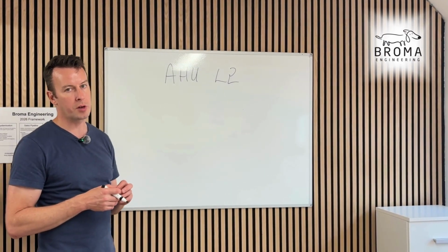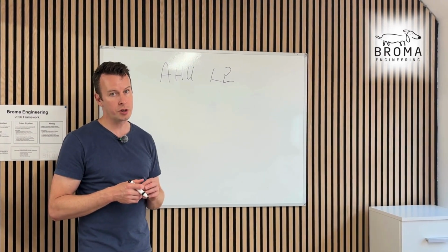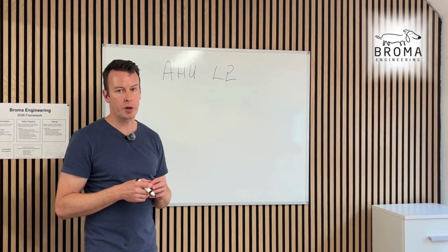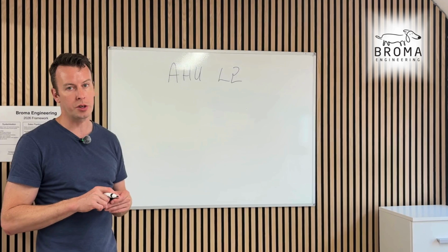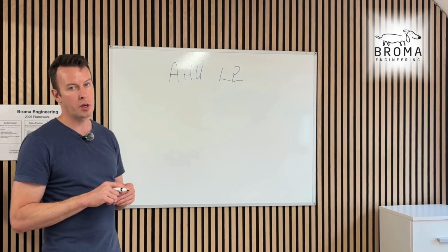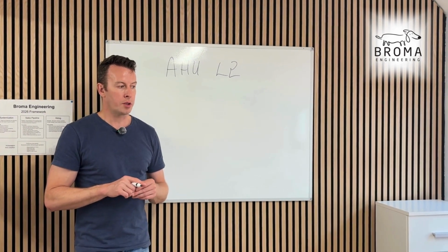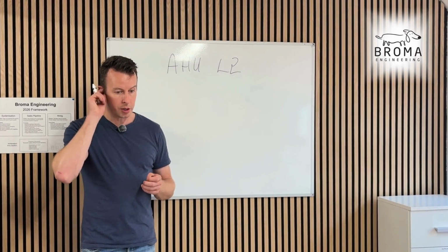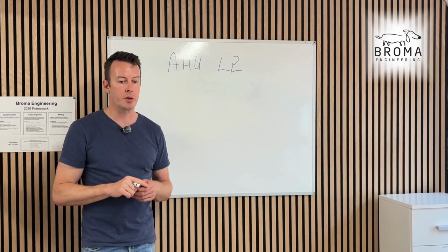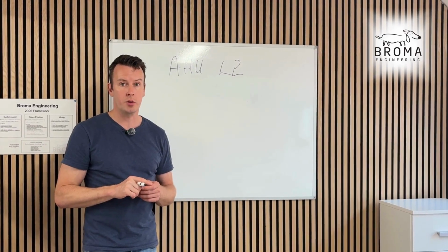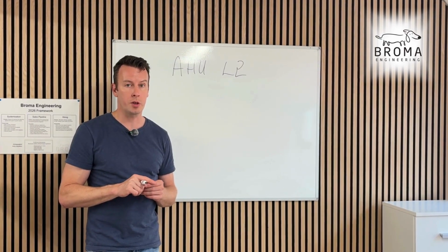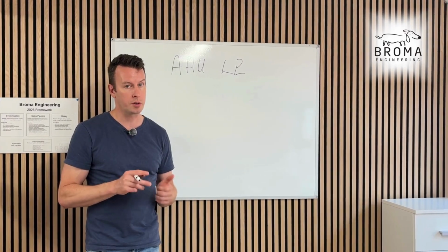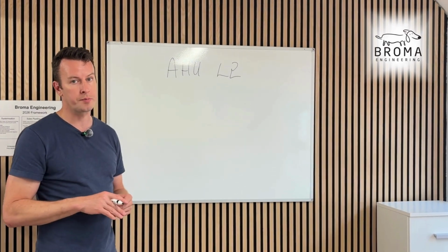Sometimes they want you to leave a comment in every check sheet, and if you're doing 20 AHUs or whatever, it's going to take a long time to go into each check sheet and leave a comment saying why it's not applicable. And this will fall into the GC scope often, and just make sure that there's an allocation, a resource to do that. It's a pretty boring task, but there's someone there to do it if it needs to be, and it's priced and costed for, like time and money is going into this.